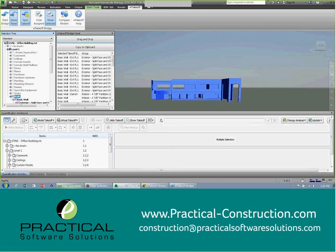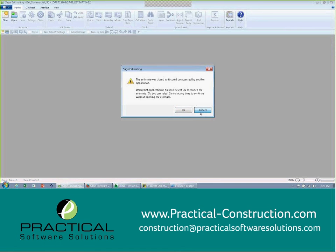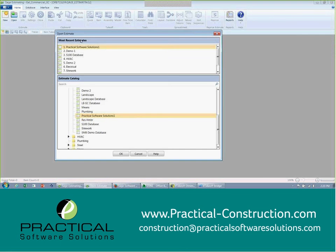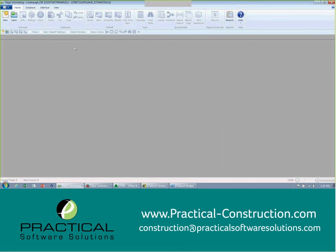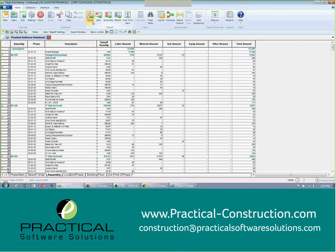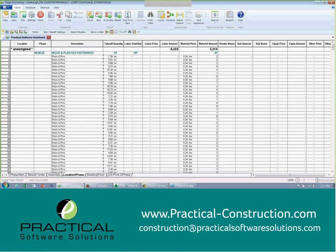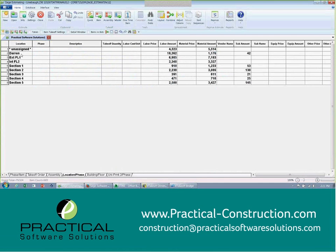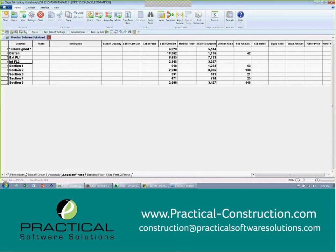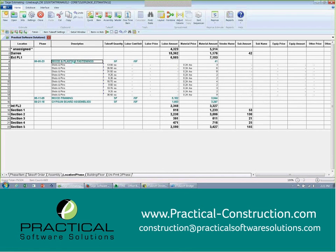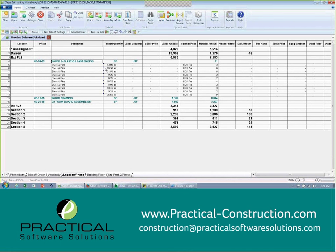So let's jump away from the model, open up the estimate. And now what you'll see is we have all of those walls, all of the slabs from the 2D broken out for us. We can break it out by location. So now we have Darren, we have the exterior floor 1, interior floor 1, and all of the sections right here as well. So think about those work breakdown structures and using location as a way to break out those costs the way that you want. And as you'd expect, when you get into this, you'll take a look at these particular blue triangles that we have here. Those will take us right back to the applicable object in the model. All we have to do is right-click, and they'll take us right back to that particular object.